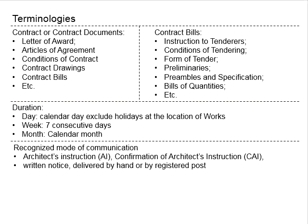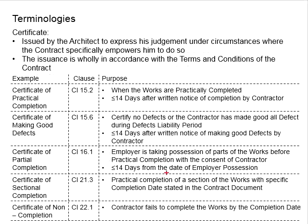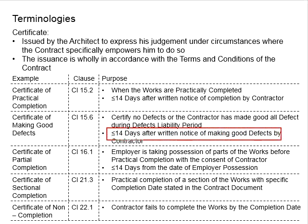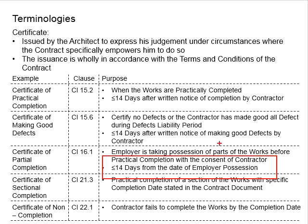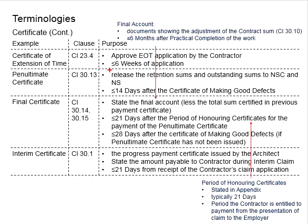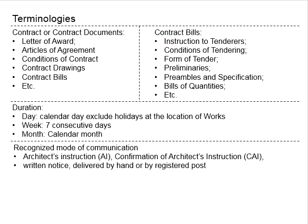Next, we talk about duration. In the conditions of contract, duration limits are normally stated. For example, within 14 days after the date of employer possession, less than six weeks for applications, or less than six months after practical completion of work, and so on.